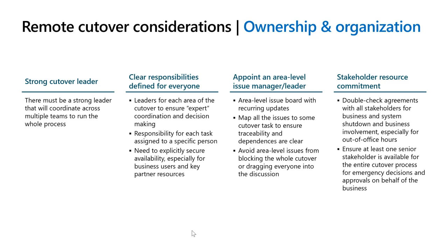Strongly recommend you have a strong leader that coordinates the multiple teams in that go-live weekend, right? That's not necessarily the same person that was the cutover leader, right? Often it is, but it's not necessarily. This is a kind of sergeant major type of personality, right? They are directing traffic, they are very firm, they're very clear, they're saying step 17, yes, go.